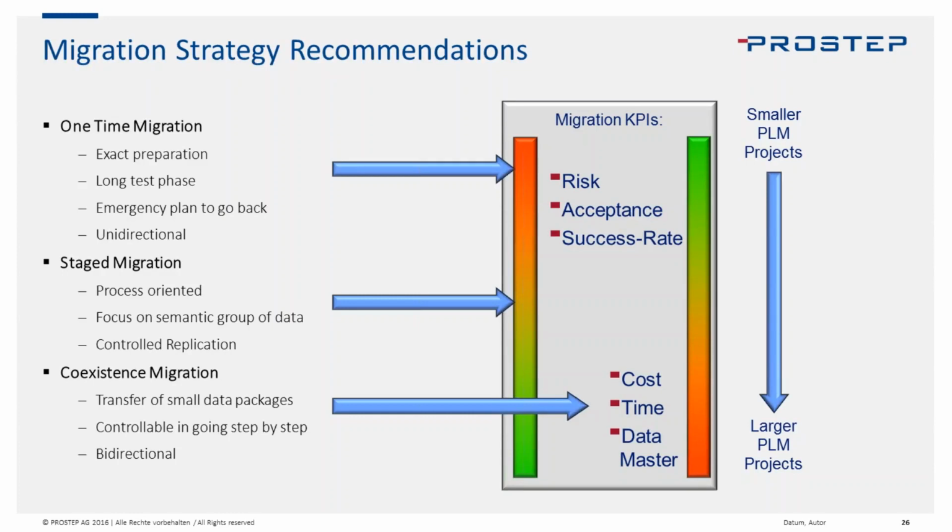And then finally, coexistence, which takes longer. There's higher cost to it, but you can distribute the risk a little bit better, and it lends itself to larger PLM projects.